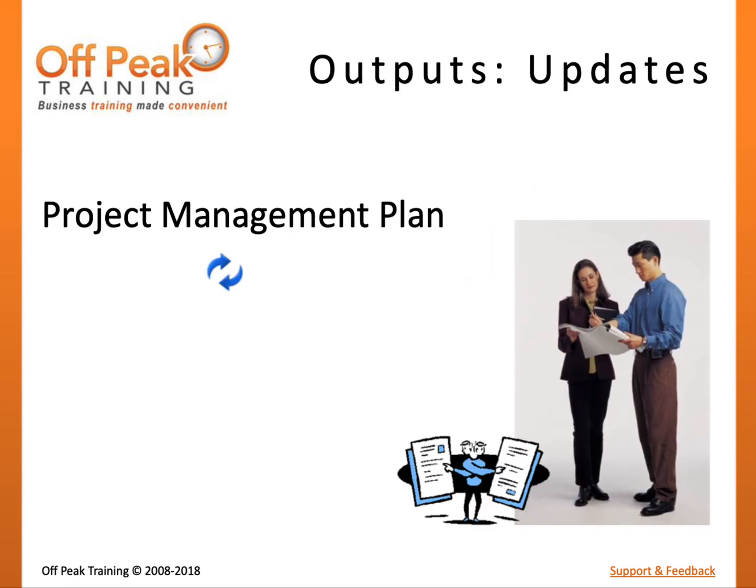Finally, many processes may lead to updates to the project management plan. Since the project management plan and other project documents are not subject to the same levels of approval that baselines are, these updates will not require formal change control.